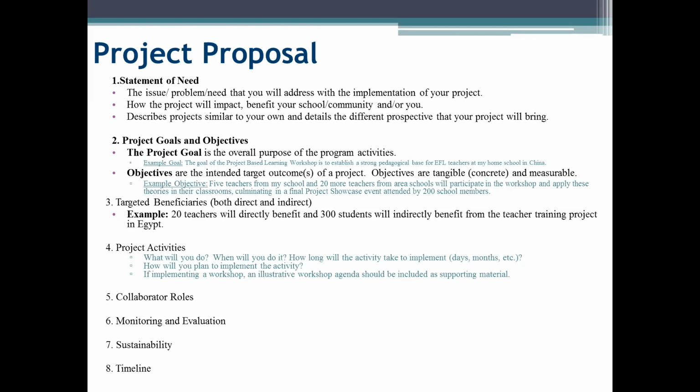and measurable. For example, 5 teachers from my school and 20 more teachers from area schools will participate in the workshop and apply these theories in their classrooms, culminating in a final project showcase event attended by 200 school members. So estimate the numbers if you need to, or estimate based on what you know when you're doing these objectives, but make them as clear and concrete as possible.